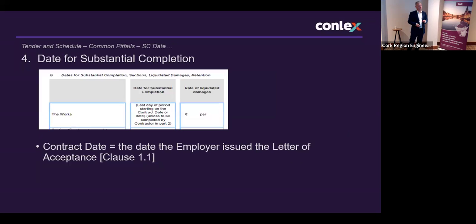Okay. This is where I think the OGP has created the confusion itself in relation to the date of substantial completion. Very often, it is important that we all know and everyone is clear as to what the date of substantial completion is, because it has many implications. You know, the flexibility period, release of retention, loads of implications as to what the substantial completion date is.